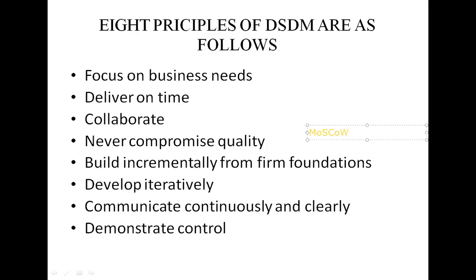Then we are using another technique called time boxing. Time boxing is associated with an incremental approach. Here the scope of the delivery for an increment is rigidly constrained by an agreed deadline.